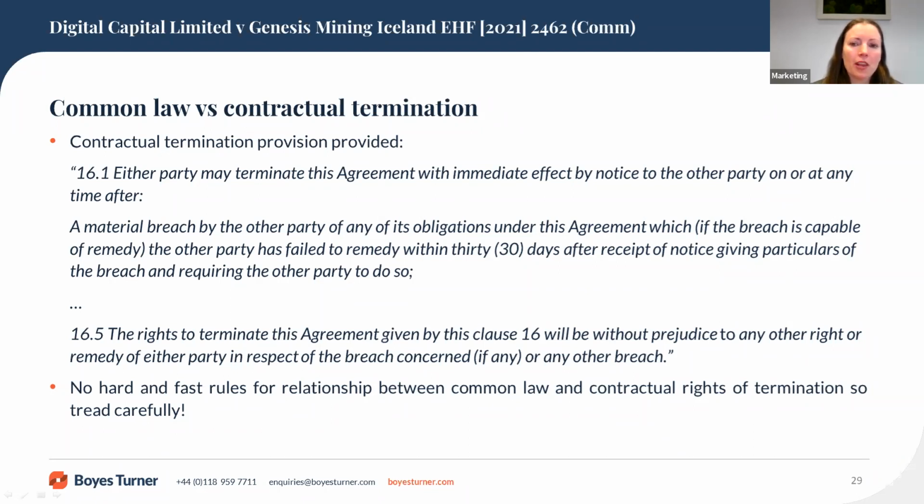She went on to consider whether the breaches were in fact repudiatory. As those breaches were fact specific, I won't go into them, but suffice to say, she found that although the claimant was in breach, it was not a repudiatory breach of contract. The defendant was therefore not entitled to terminate the agreement as it purported to do and was itself in repudiatory breach of contract. The claimant was therefore entitled to payment of its unpaid invoices, totaling some £2.4 million, and there will be a second trial to assess the claimant's damages as a result of the wrongful repudiation.